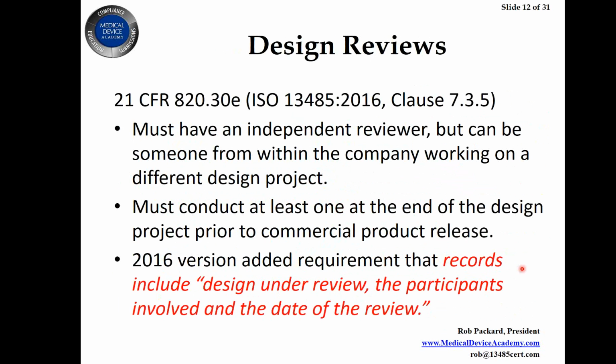So make sure your design control procedure allows you to have abbreviated plans and specify the details in your design plan. Give them a suggested outline for your design plan, but then the specific one is product specific, project specific, and it outlines how many design reviews you're going to have and what steps you're going to go through for verification and validation. If you're using justification for not doing all the verification and validation over again, include those scientific rationales, or the writing of them, somewhere in your plan so people get that done.